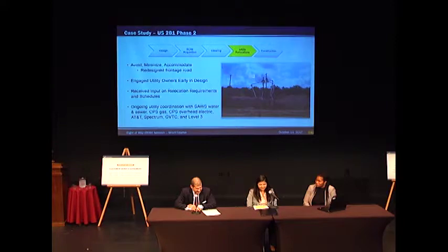Okay, so the other thing that we did on this project is we engaged the utility owners early in design. We had a kickoff meeting in January of this year, which is 2 years in advance of the letting, so early coordination is very important. At that kickoff meeting, we involved everybody: the consultant, all their sub-consultants, and all the TxDOT staff who were going to be reviewing the project, and we really emphasized the need for utility relocation avoidance. So that was a success that we had early on this project.